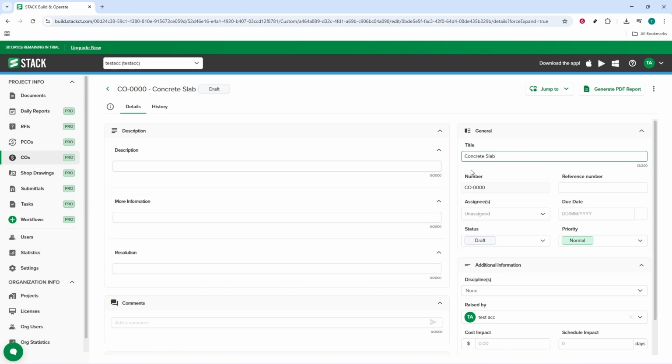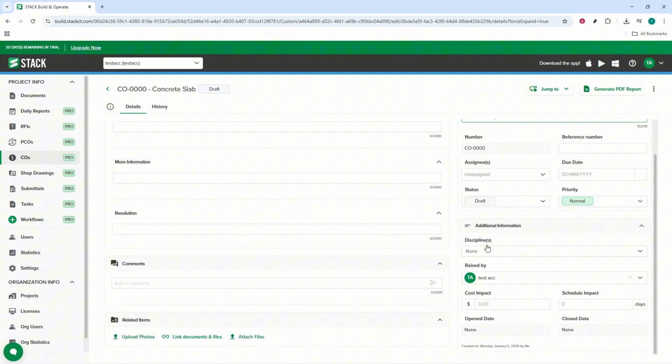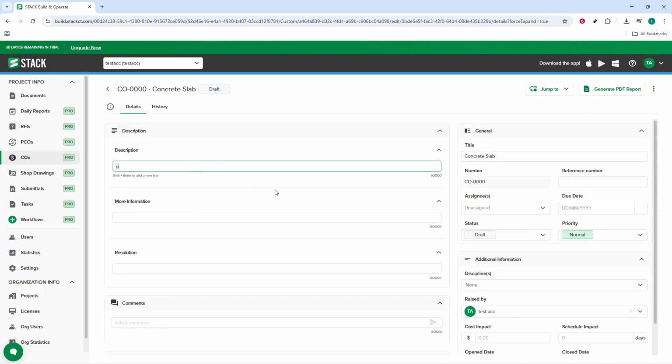Category or division is optional, but it can help group related items if you're aligning to standards. The description field is great for quick notes or scope clarification, like including rebar or excluding vapor barrier. When everything looks good, save the cost code.